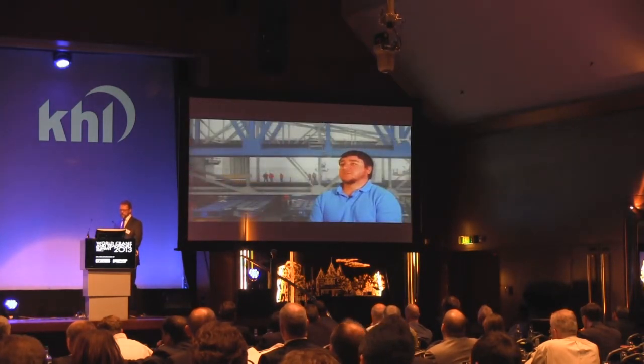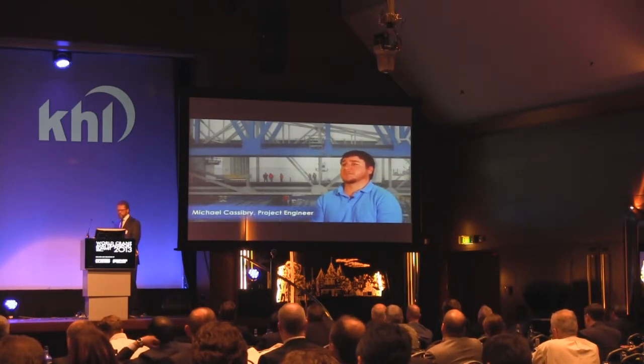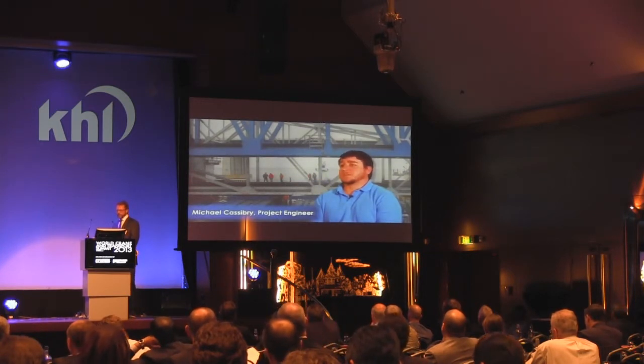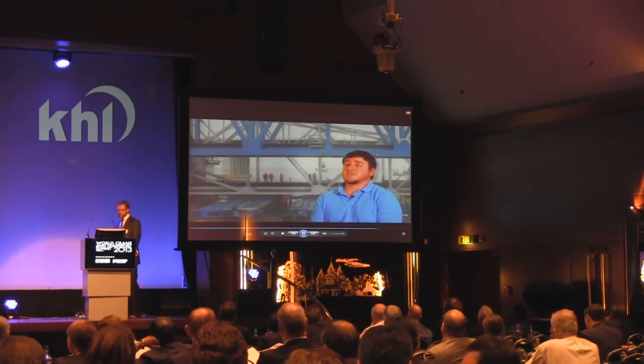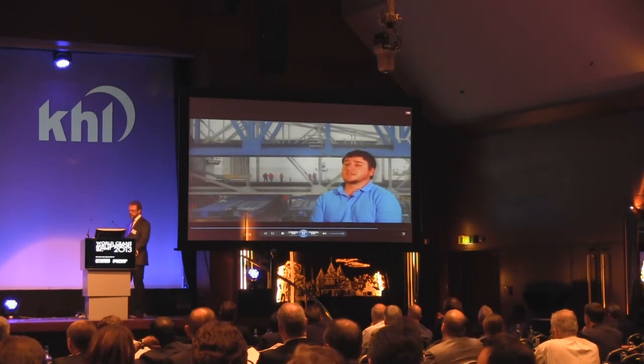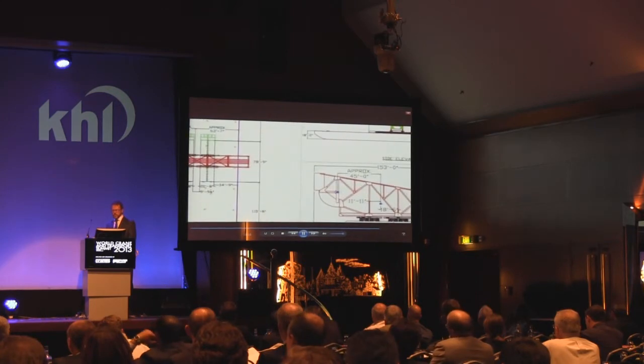When it came to removing the old bridge, the customer's initial plan was to dismantle it in place, but with tight time constraints and environmental concerns, this didn't seem possible. Another critical issue is that a Basque bridge, by design, has its center of gravity off to one side and not even located over the channel, literally making it impossible to move without repositioning the center of gravity or dismantling it altogether. We proposed several solutions for the customer to remove this bridge.